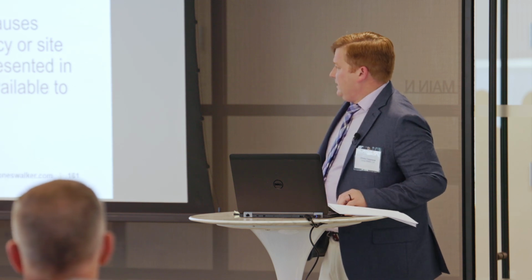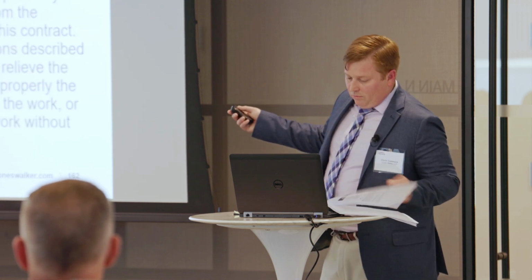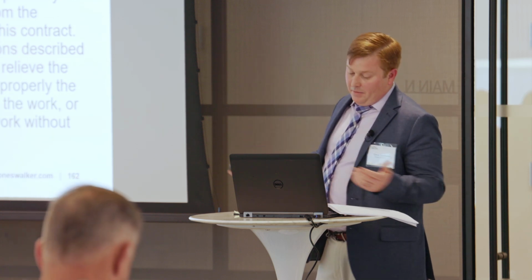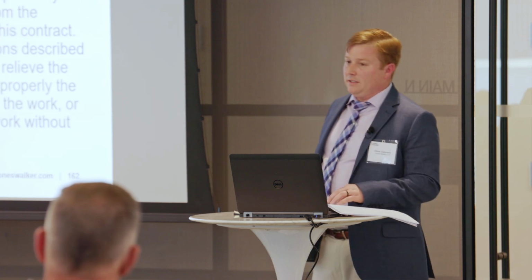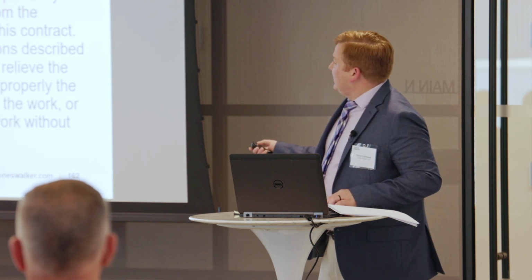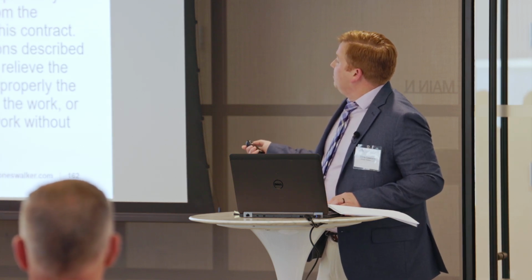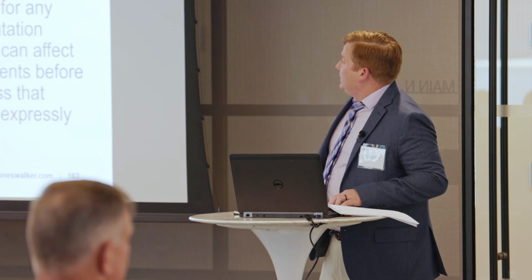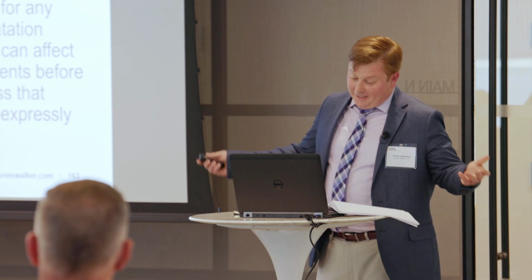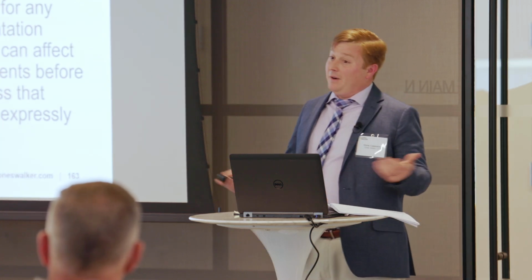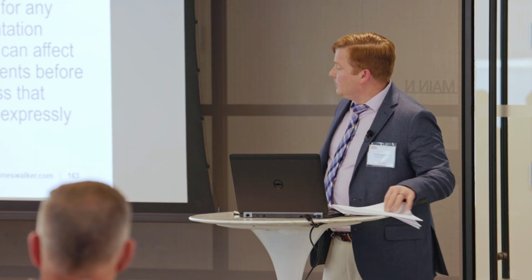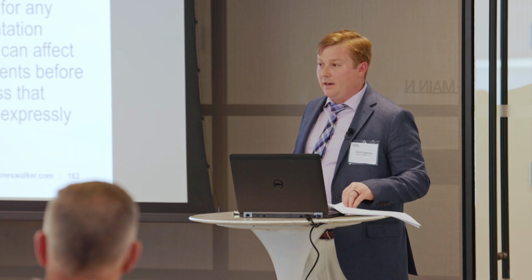And this is in, so I won't read this, but here for a site investigation clause, this is an example from the FAR. You're acknowledging that you satisfied yourself as to the existing conditions on the site, so it's no excuse that you find something that you should have found because you had an obligation to do so. Same is true of these geotechnical information disclaimers, right? It's basically saying we're giving you information, but we're not responsible for what you do with it. And you're not going to turn around and make a claim based on the data we provided about site conditions.